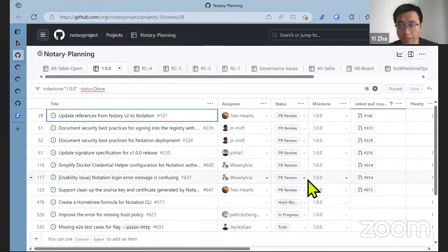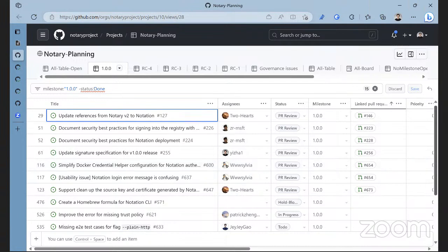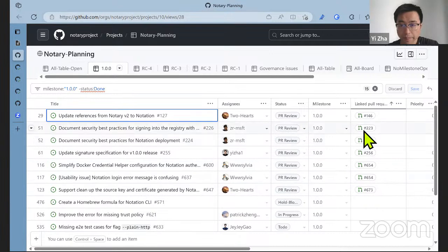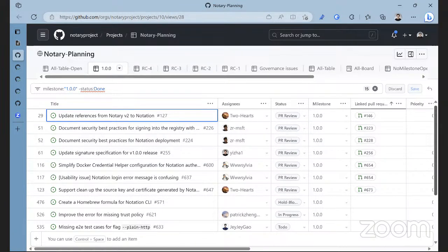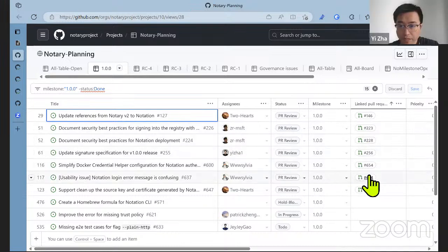The review effort may take 2 or 3 days. If we can do it quickly, maybe 1 or 2 days. So do we think we can release RC6 by the end of this week, or are we looking at Monday next week? No, we are targeting this week because all the PRs are ready for review. Okay. I do think some PRs already have maintainer approval, so maybe Pritesh or Samuel can take a look.